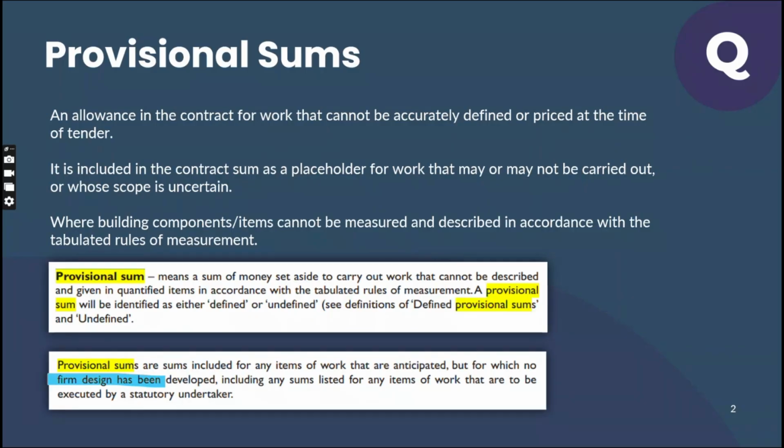Fifth condition, when you need a specialist item and need full control on QHSC, quality, health and safety. When you wish to have full control, you will put it as a PS item. Again, there is a budget issue and you don't want to omit an item. You still want to keep it in the contract and try to accommodate it at a later stage after implementing value engineering, descoping or design optimization.